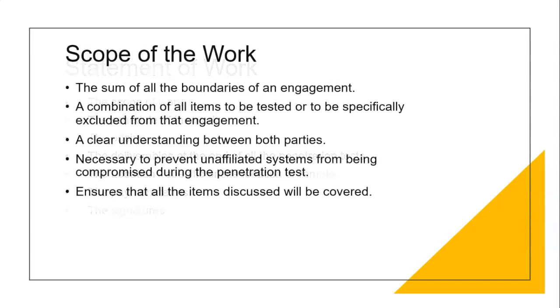Without exception, the most important part of any pen test is the scoping of the work. This is the sum of all the boundaries of an engagement, a combination of all the items to be tested or to be specifically excluded from that engagement. A clear understanding between both parties is necessary to prevent an unaffiliated system from being compromised during the penetration test. This ensures that all the items discussed will be covered.